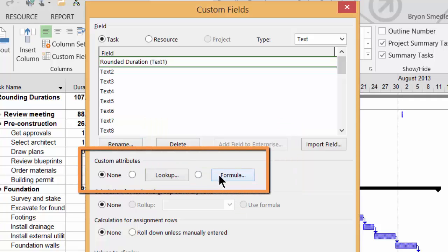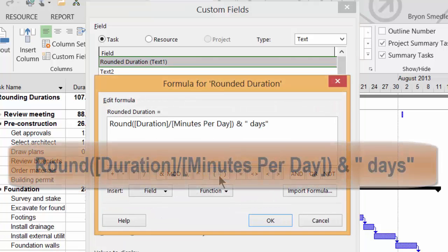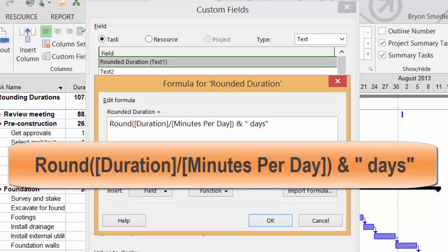Then in the Custom Attributes section, I'm going to click Formula and enter in this formula. This will take the existing duration field divided by the number of minutes in the day, then take that answer and round it up or down. The result of the Round function will then be concatenated to the word Days.